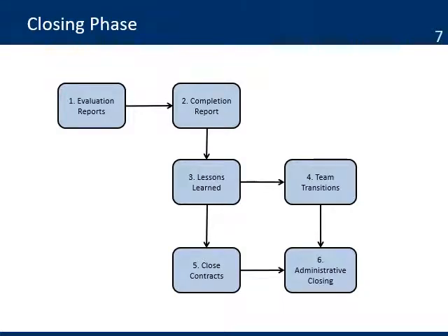You work to close the donor and vendor contracts. You make sure there are no outstanding payments to vendors and all donor requirements to close the project have been taken care of. Finally, you monitor the administrative closing, ensuring that any equipment or office space rented is returned. You close services of utilities, and bank accounts, inventory, and access to information systems are closed.